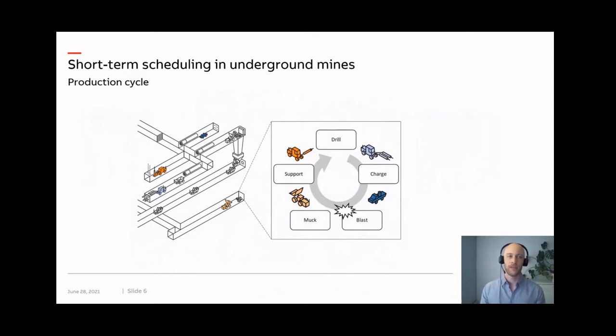Now, regardless of the mining method, the excavation follows some kind of production cycle. That's a stepwise sequence of activities that needs to take place in order to separate a certain volume of rock from the rock mass at a multitude of locations simultaneously in the mine. So this basically boils down to drilling, blasting, and reinforcing, and then repeating this all over again.